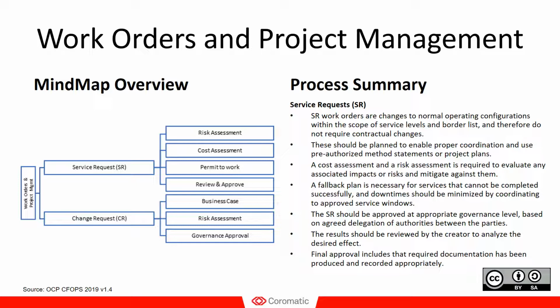Based on these things, we should find a suitable time and date to perform the work and to deliver its results. And that means that we provide a permit to work slot that makes sure that we do not jeopardize the site operations or the end users that rely on its operations. So perhaps it's not a good idea to perform the work at month's end, because that's when this critical facility is mostly used. Then let's do the work in the middle of a month instead.